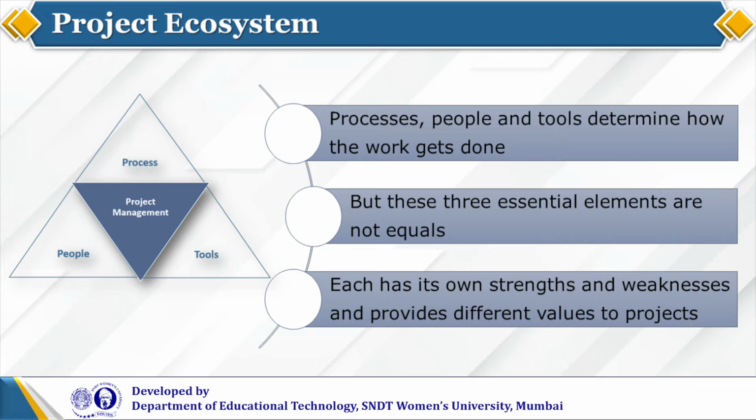Sometimes processes are very important. Sometimes, like in the construction industry, my people are very smart and they can really work fast. So we can make one slab in one day, the other slab on the second day, and the third slab on the fifth day. But the process doesn't allow you to do that because slab curing time is 21 days. You cannot put another slab in less than 21 days.